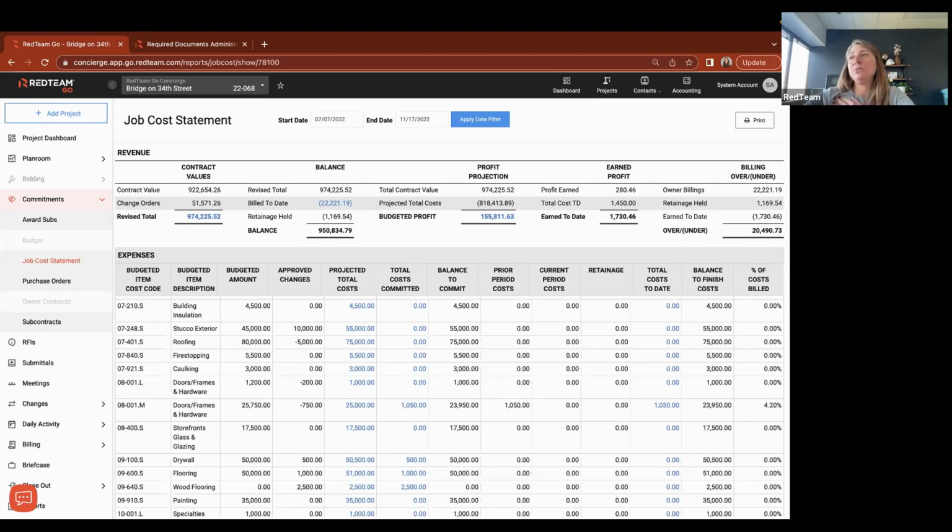So that's a really hard one, Julie. If the owner pays in multiple checks, I would tell you to void and revise the owner bill and split it into two owner bills so that you can record each payment against the correct invoice. That way your next owner bill, you'll have the current balance due.